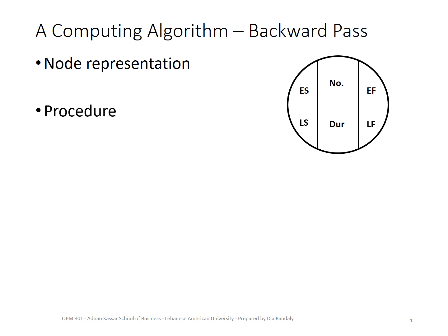To start, how can I start? Since I don't want to delay my project, I set the late finish of the last node only to be equal to its earliest finish, meaning that I'm telling you I cannot give you any flexibility. You are the ending node. You were found to be finished at your earliest at that time, so you have to finish at your latest at that time. That's it. Now, within a node, moving backward, it will be the opposite of the forward pass.